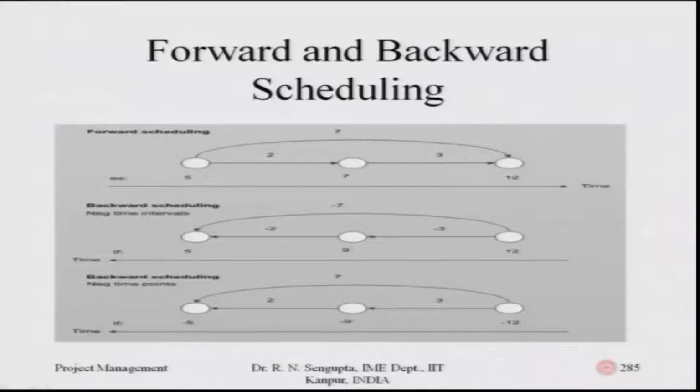So, this forward scheduling and backward scheduling I am just bringing into the picture. The reason being that when you are trying to do the forward scheduling and the backward scheduling, I did mention, even though it may be a repetition, if you remember, we mentioned the concept of the CPM and the PERT is based on the fact that once one job ends, then only the next can start, which is the end to start concept. But there are three other concepts also, which is end to end, then start to start, and one is start to end.